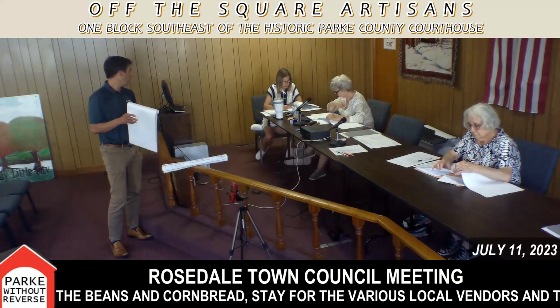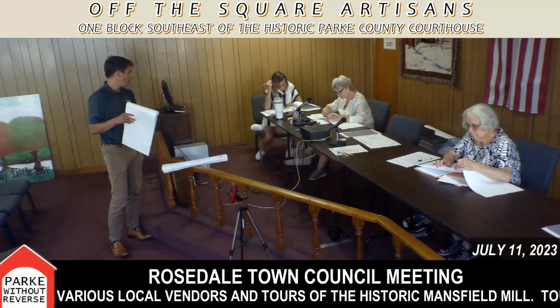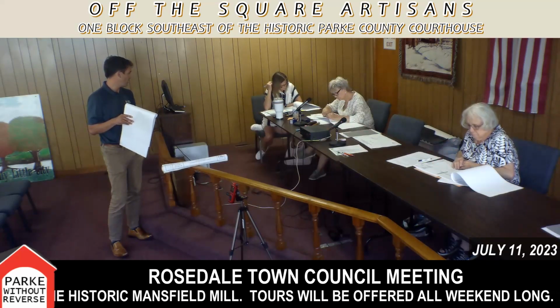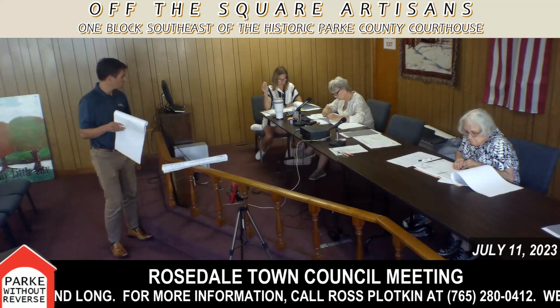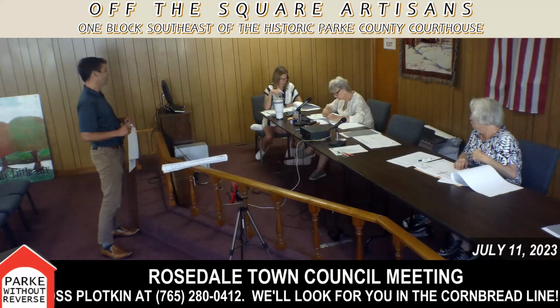But we are going to still protect it. Now we've got a pretty big area there, and right now that's about a $30,000 cost when we have it in there. So we have some room, I think, to play with how big that area is based on our final budget. Okay, so basically what he's talking about in not engineering terms is that the Rogers family